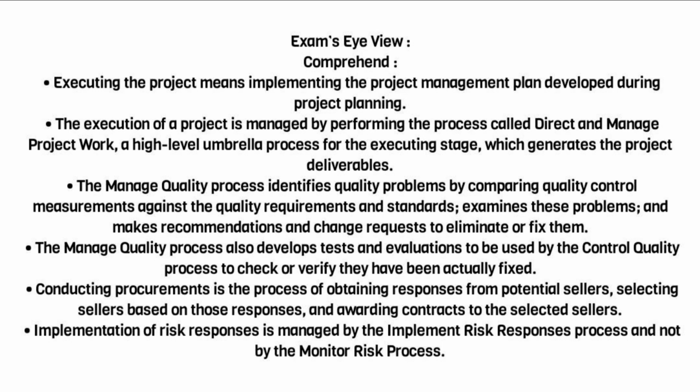Conducting procurements is the process of obtaining responses from potential sellers, selecting sellers based on those responses, and awarding contracts to the selected sellers. Implementation of risk responses is managed by the implement risk responses process and not by the monitor risk process. Look out.